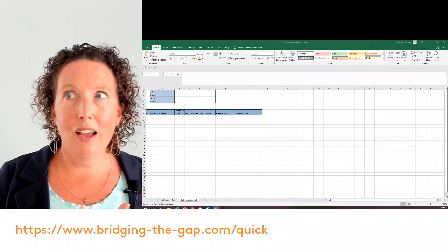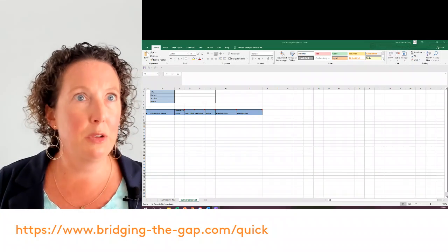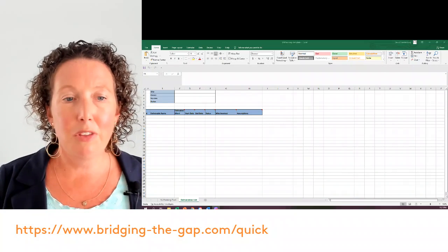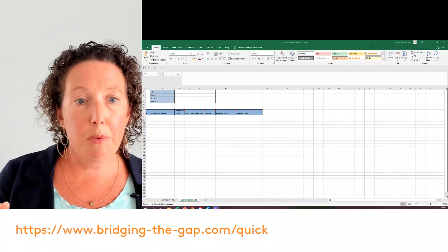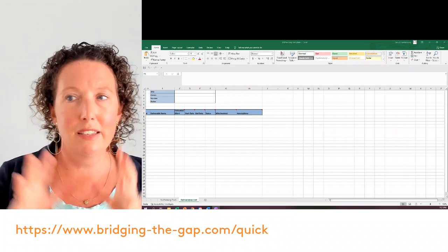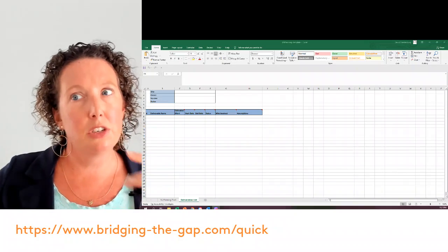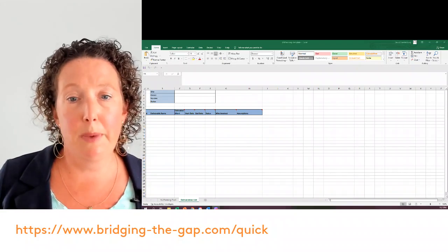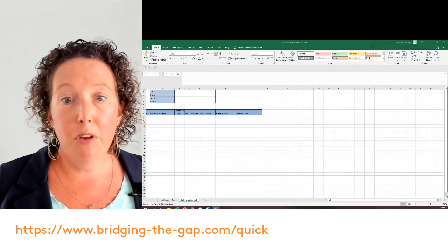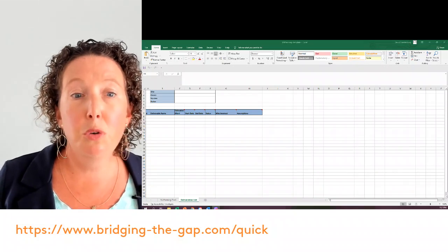Now, just because it's a 4-hour deliverable doesn't mean you start and end it next Tuesday, right? There might be some stakeholder feedback you need to account for. There might be some review processes. So you want to give, like, is this a 1-week duration? Is it 2 weeks? Like how long from a duration perspective are you going to need? You can use this to track your status and also who is involved.